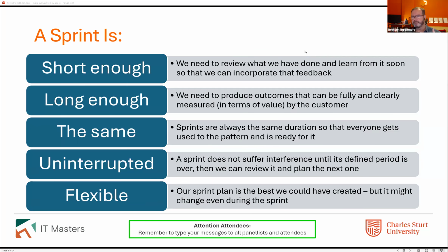But a degree of flexibility, because there are going to be occasions where somebody has a user story that's just more complicated. We can't figure this out. We thought we could get this done. Estimates were wrong, missing information from the customer. Sometimes you get a user story that you say, look, just push that back to the next sprint. We're just not going to get it done in time. There's no point half doing it. So we're not going to even go any further. Let's pull something else in from the product backlog into the current sprint, and we'll do that instead.